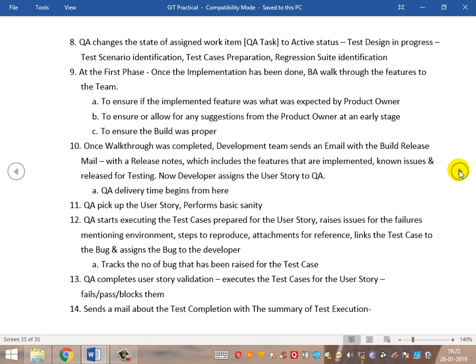What is this step? This is the first phase where the development team wants to deliver the product — the changes that have been made. The BA needs to walk through the features to the team along with the product owner. If this is implemented or incorporated in the process, it ensures the implemented feature was as expected by the product owner. At the first place itself, the product owner gets confirmation that the feature they had envisioned has been successfully developed with the same functionality.